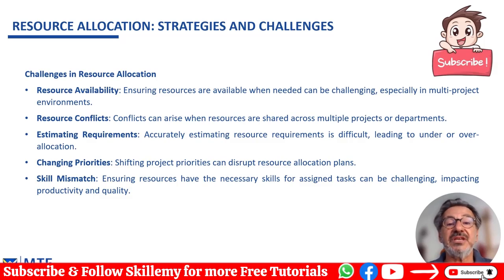And estimating requirements. Accurately estimating resource requirements is difficult, leading to under or over allocation. Then, changing priorities. Shifting project priorities can disrupt resource allocation plans. And skill mismatch. This is perhaps one of the least understood but most important things that you need to avoid: ensure that resources have the necessary skills for the assigned tasks. Because if you just say, okay, I don't have this type of coder, but I'll use another one, what happens is that maybe you will get the task ready, but probably it will take twice as much time, and that will give you a whole problem in your critical path method and in your project management.